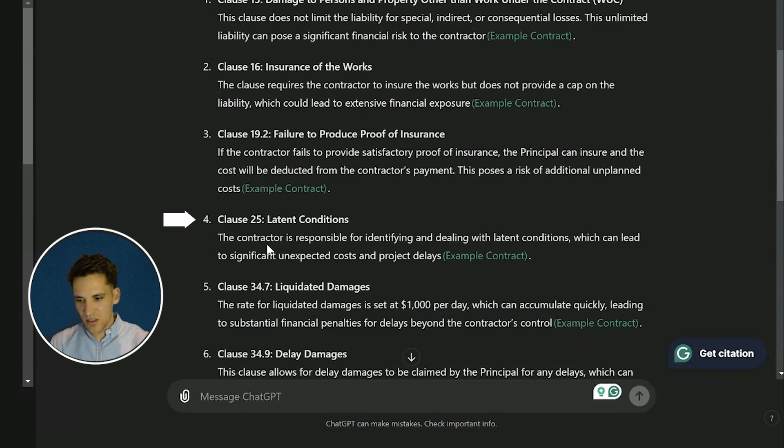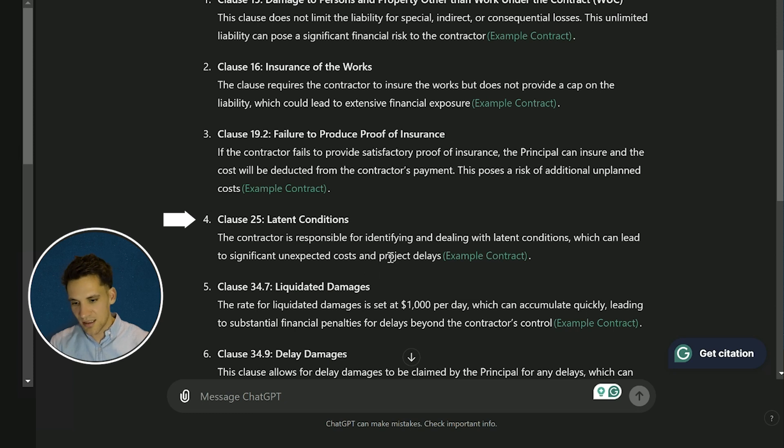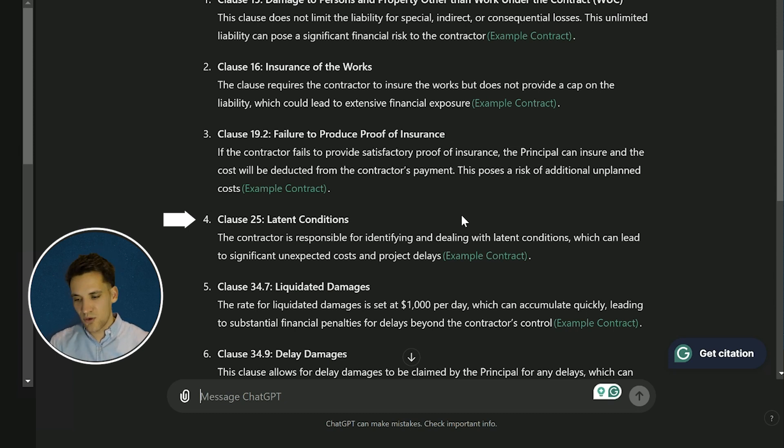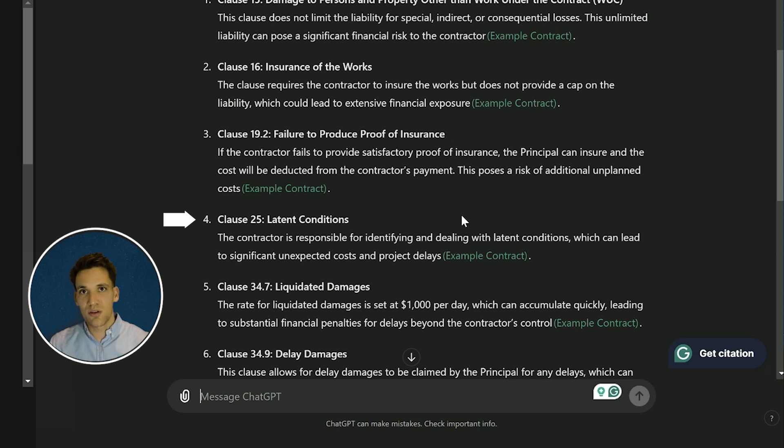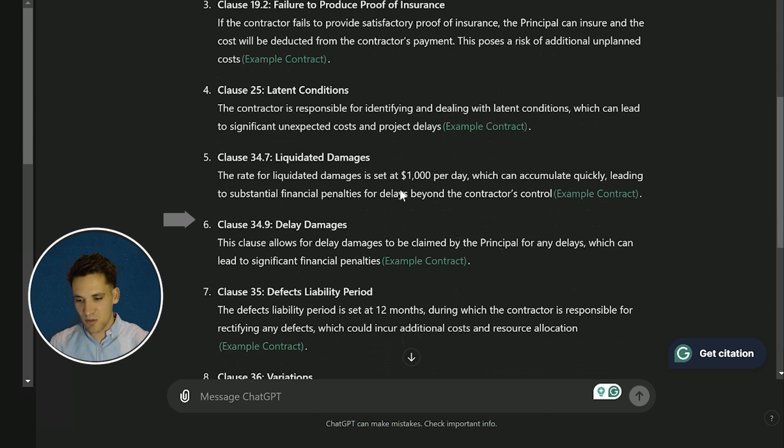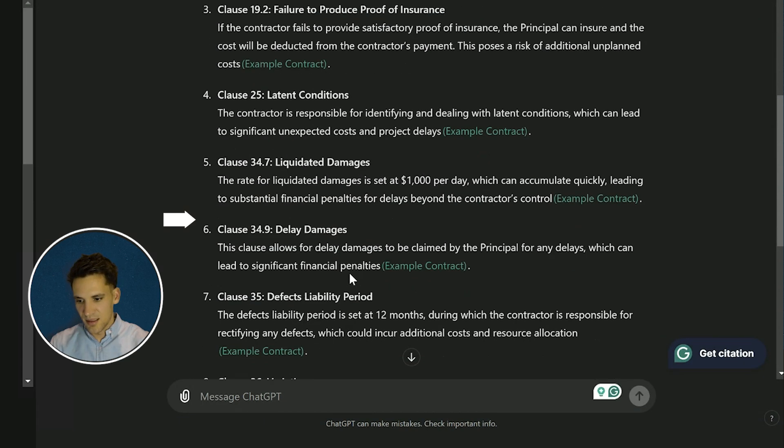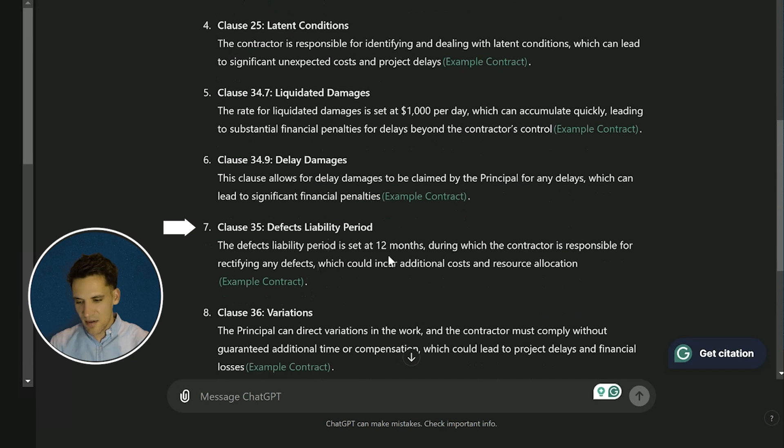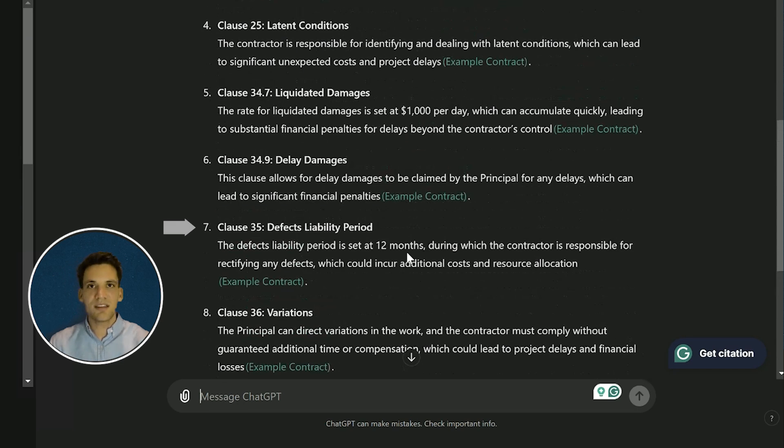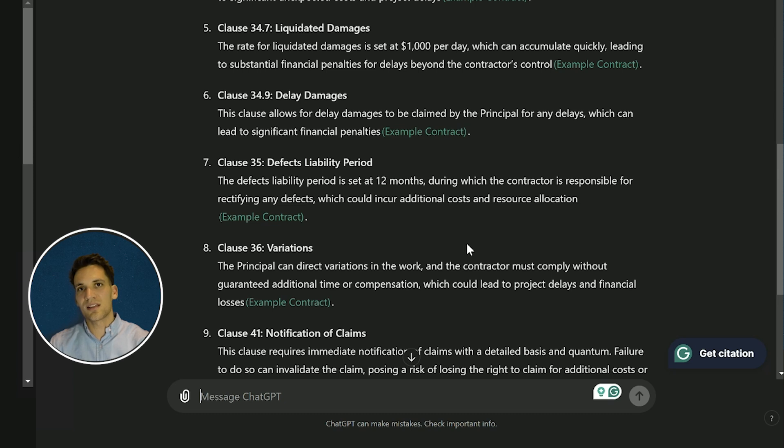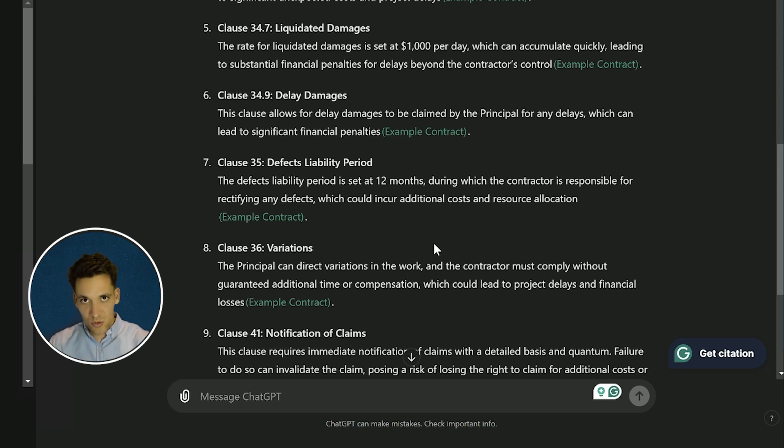Latent conditions - it says the contractor is responsible for identifying and dealing with latent conditions which can lead to significant unexpected costs and project delays. That's definitely one we'd want to identify and depart from. When we've been tendering the work, if we're not aware of certain conditions, we definitely want to flag that we're not going to be responsible for them. There's liquidated damages, delay damages, a defects liability period. So basically, it's just gone through the contract and quite quickly picked out 10 clauses that as the contractor pose risk for us.